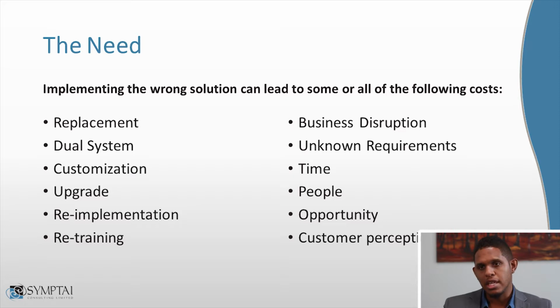A lot of the time you'll see missing requirements for things like future state, because we end up with a lot of these disjointed systems. We buy a core system not realizing that it may not have some of the subsystems that we need already built in, and we end up buying additional systems and having manual processes to move information from one system to the next. Those then balloon out of control, and we haven't really done the right capacity planning. So of course, these things come up as unknown requirements that make themselves obvious to us as we're building out our system.